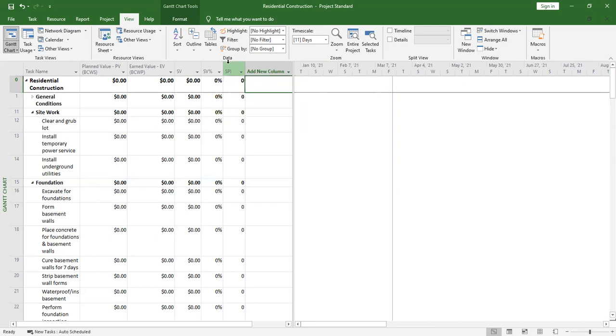How are you performing? It will compare the budgeted time to the actual time. So if the budgeted one is above the actual, then it will be 1 and above. But if you've spent more days than what you planned, it will be less than 1. So it will show you how you're performing. That is the schedule performance index.